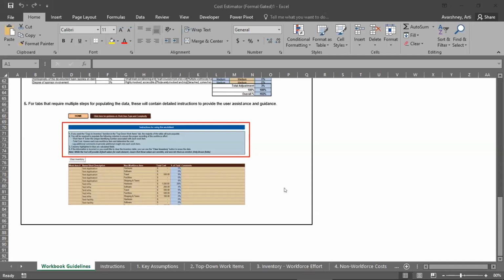And I cannot stress the importance of cost estimation enough, other than saying that if you don't have proper estimation, then you might be running into trouble very easily, right? If a project is going to cost $1 million, and unfortunately using a wrong tool or wrong assumptions, you project $500,000, that means you are off by 50%.